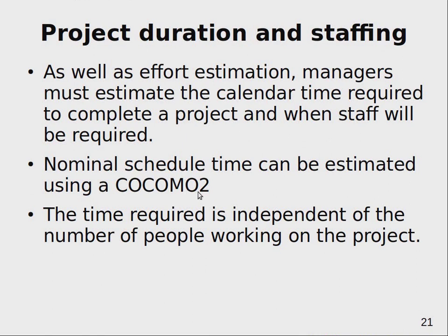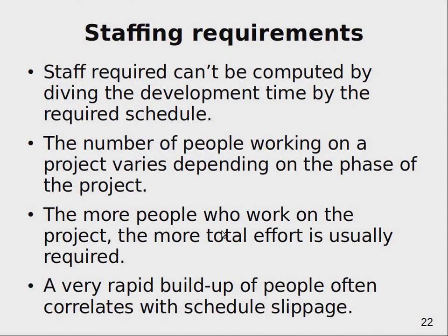So remember, like I told you about this COCOMO 2 method, you calculate the plan from the work needed to be done and the work effort needed, depending on the complexity of the project, depending on how much you can parallelize it, and then you get an estimate of calendar time. And if you do it in the opposite direction, almost always this time will be too short.